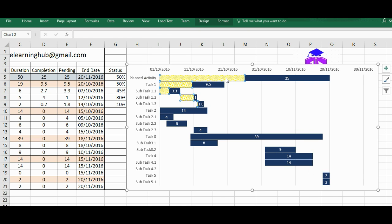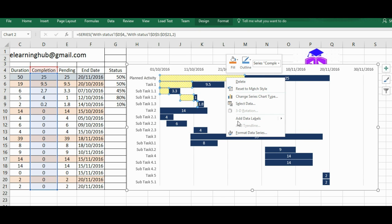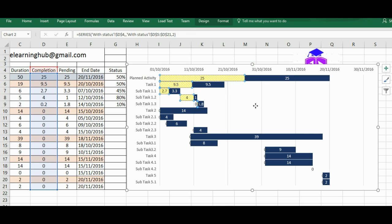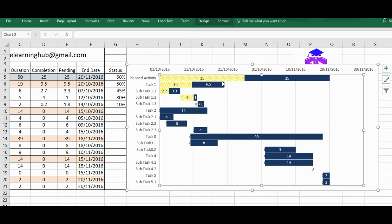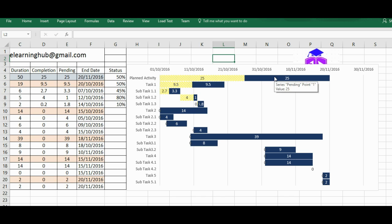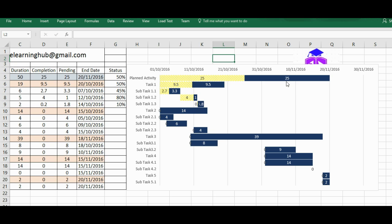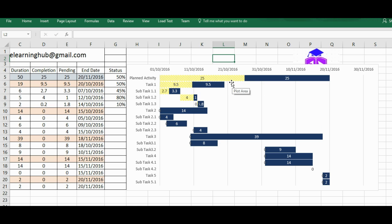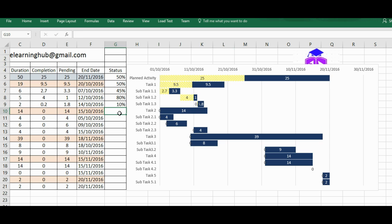So now overall activity, 25 days work is completed and more 25 days need to be completed. This is what we can see from this particular chart. Earlier it was like complete 50 days were given, but currently what's the status of the project, that was not clear. So from this particular video you can directly say, yeah, more 25 days will be required to complete this activity. So let's put some random numbers in order to fill this.